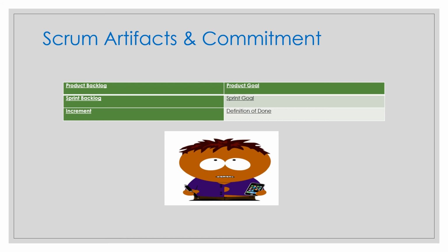To release the software, the product owner will take the decision. Work cannot be considered part of an increment unless it meets the definition of done. Your definition of done is the commitment for the increment. The definition of done is a formal description of the state of the increment when it meets the quality measures required for the product. The moment a product backlog item meets the definition of done, an increment is born. When your PBIs meet the DoD, you can do the deployment, and your increment is born.